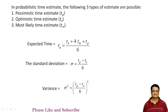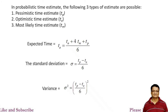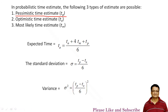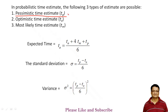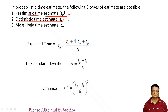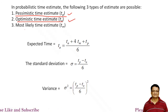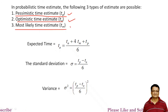There are three time estimations used in PERT. The first is pessimistic time estimation — if everything goes wrong, what time will it take? Optimistic time estimation — if everything goes well, what time will it take? And most likely time estimation, that is the average time estimation.